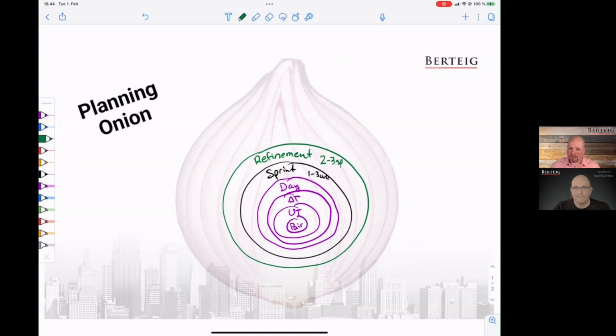Sometimes we get something that we have to rush into the sprints and get it done, and we might not have the time to refine it properly the way that we would like to. But other than that, we would like to prepare. And I found that it takes about 4 to 6 weeks to work with the stakeholders and others to get the items good enough that the team can effectively do them. So that's refinement. That's a period where we track that clarification work, about 2-3 sprints.